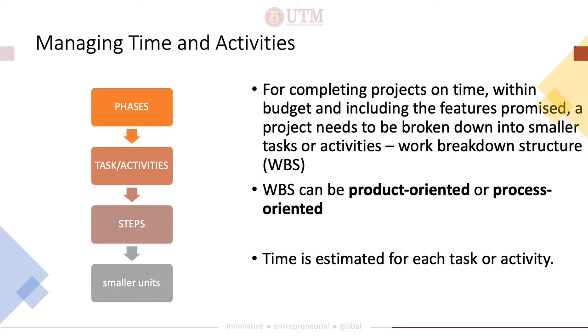First and foremost, you must understand that the selected project will go through all the phases in the System Development Lifecycle, or SDLC. All SDLC phases, for example, analysis, should be broken down into specific tasks, activities, steps, or further smaller units. This is what we call the Work Breakdown Structure technique. WBS can be product-oriented or process-oriented.